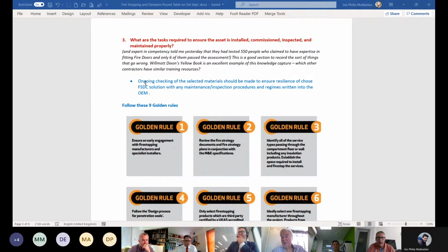And that's why people are using SFG 20 so extensively as a checklist. SFG 20 is great, but it's not all encompassing. There are certainly asset types that we've identified that aren't covered in it. And it's only really for maintenance and, to some extent, inspection. Whereas we also need a similar type of checklist for installation, commissioning, and decommissioning. So that's really what we're trying to get to here, if that's possible.